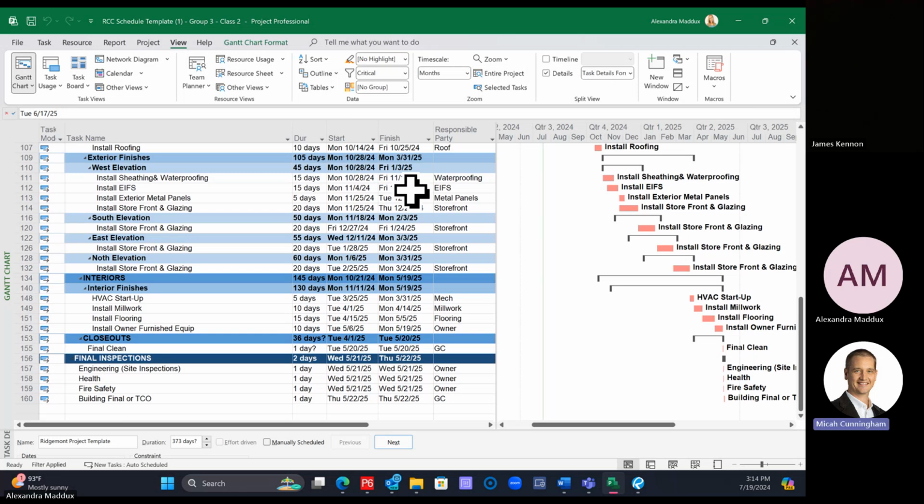Actual weather days is 30 days. I'll put that in. The only push in there is the very bottom. As I have delays, I'll pull a day out of that. Yeah, that'll work. If you have a weather bank, it depends on the project if there's a weather bank in it or not.